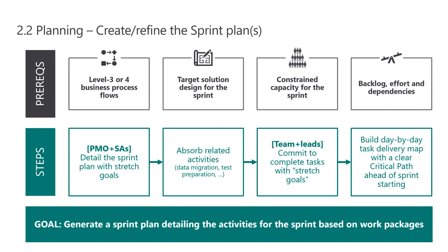You then don't want dead time with the project. You want to be able to go to your backlog. There's something that's already groomed. You already know how you're going to be able to deliver that at a high level. You pull it into the sprint. You make sure that the total effort is decrementing in the right way, so you're not building up a big backlog. You're not creating technical debt.